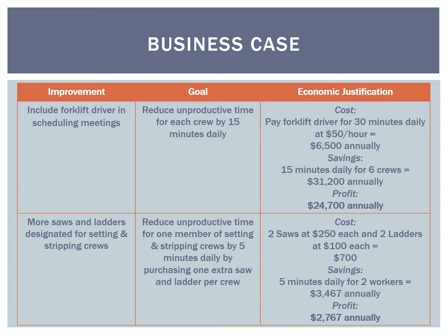Including the forklift driver in the morning meetings requires the additional cost of paying the driver for about 30 minutes daily. However, if the forklift were utilized more effectively, it could result in huge savings across the site, so my economic analysis showed that this would be a worthwhile process change.